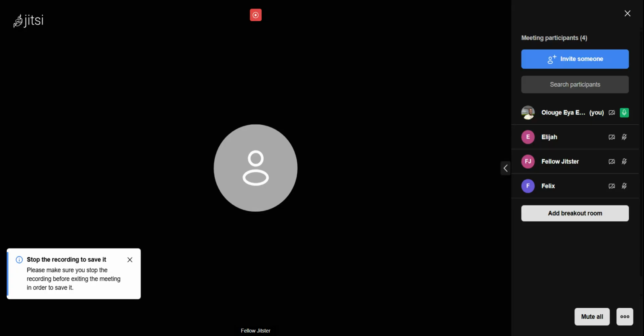There you can select the people you have added. If you have not added somebody, the person will not show there. Meaning you add the people first before you can select them from the drop down to assign them to the various tasks. So if you see somebody's name under design, it means you should assign that person to the design phase of the project.